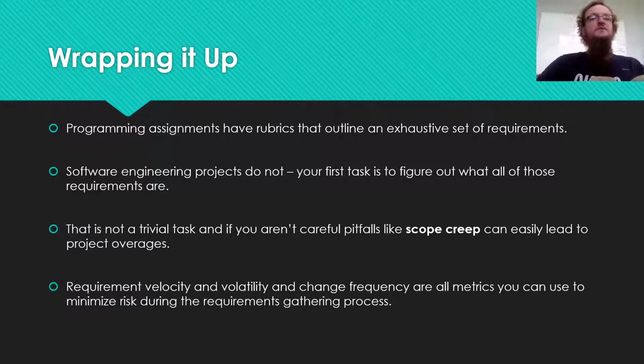On the flip side, if you have a constant deluge of requirements and you have a constant deluge of changes to those requirements, you're not in a position to go to even analysis yet, because any work that you do in the other phases of the development process could potentially be undone by one of these changes to a requirement that's fairly frequently happening. So I hope that this module illustrated requirements gathering from a 10,000 foot perspective. If you have questions, comments or concerns or anything like that, please reach out and let me know. I'm happy to answer those as best I can.